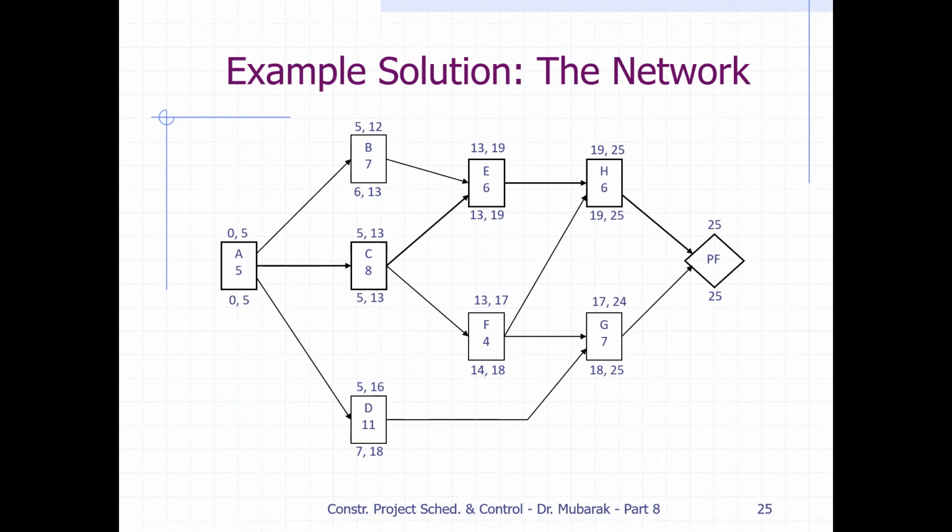So what you are going to do is see where the minimum is. So you can cut in cycle 2, 1 day from E. Because the direct cost, when you see both the paths, will be minimum at E. So E's duration will reduce to 5.